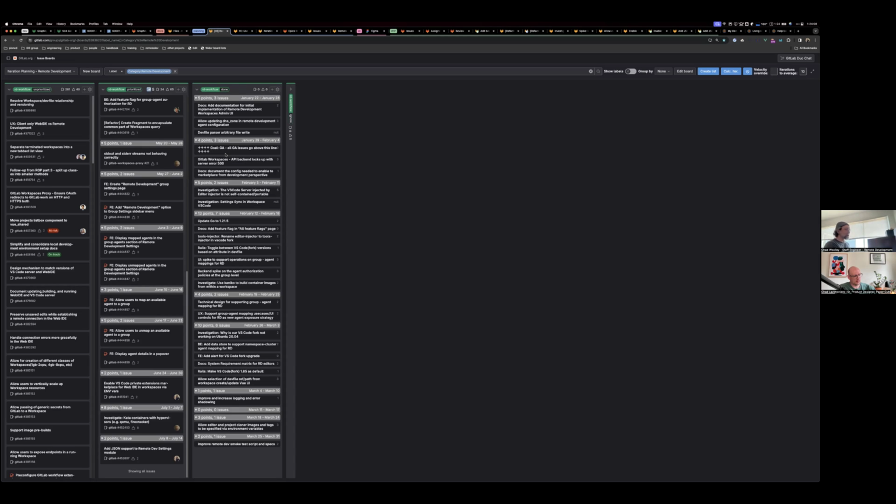And he said, not so much, but the way to explain it in a way that makes sense to people is that it's like a Kanban board, but rather than your work in process being fixed, which is obviously going to vary depending on the people you have or other factors, you're automatically determining your work in process for every iteration based on what you've gotten done in the past, assuming a consistent team strength and experience. So that's the key. It's like a Kanban board, but you're automatically determining your work in process limit.